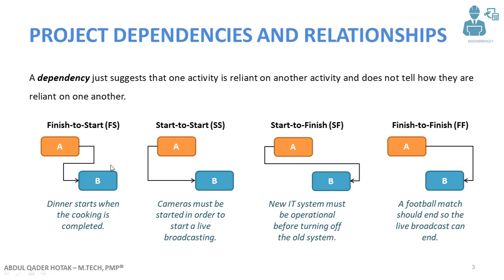There are four types of relationships: Finish-to-Start, Start-to-Start, Start-to-Finish, and Finish-to-Finish. Activities linked as Finish-to-Start mean that when the predecessor activity finishes, the successor activity can begin. For example, dinner starts when the cooking is completed.